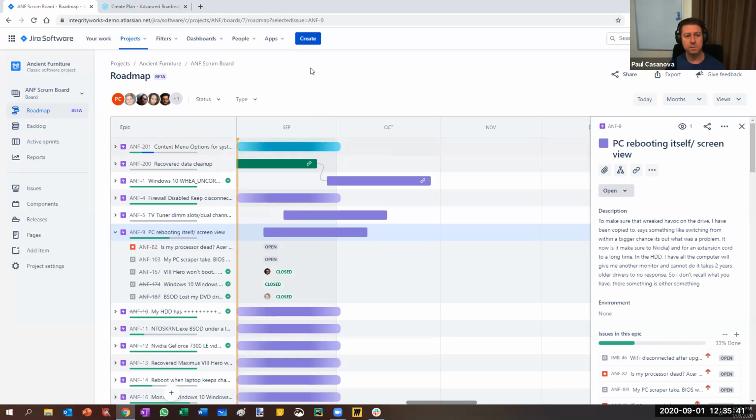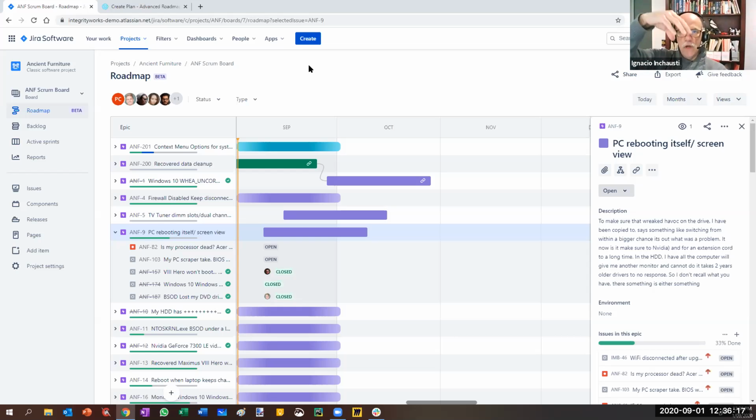So the standard Jira configuration just has 3 levels in the hierarchy. There's epic, and then the next level down is stories or tasks, or another standard issue type, and then beneath that is subtasks. And you can add different issue types at the story level or task level and subtask level as well. So we can create risks or assumptions or dependencies at that level. You can also create risks or assumptions as subtasks too, but there's 3 levels in the hierarchy: epics, standard issue types, and then sub issue types. And the point is to always start from the top, from the epic.